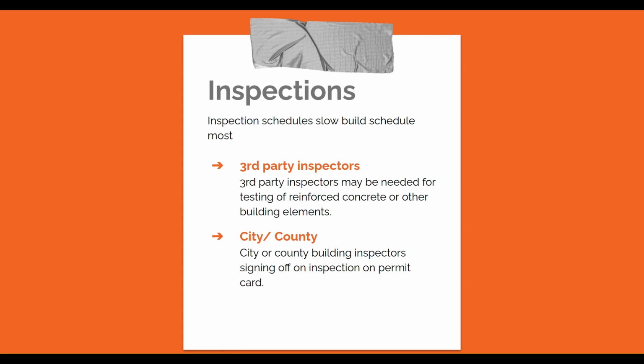But anyways, once drywall's up, you guys are pretty much ready to finish, and they're going to be back for a final. So they're going to check that all the electrical is grounded. They're going to check that there are just no problems, that what's on the plan is what was built, nothing's been changed, nothing shady's going on. And then they come in, sign you off, and if it is an ADU, they will also get you your certificate of occupancy. That means it's safe to live in, it's livable. The city has inspected it, and you can either rent it, live in it, give it to your grandma, give it to your kids. You could just let it sit there and stare at it because you like it. Whatever you want to do, it is ready to go, and you can fully use it.